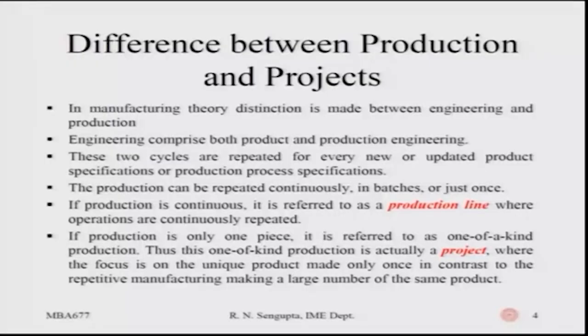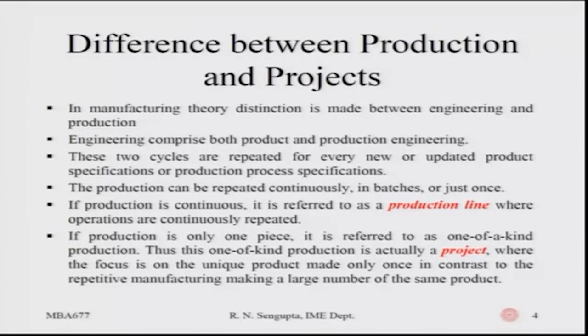Production can be repeated continuously, in batches, or done just once. The concept of 'once' — when you do a big project that will not be repeated again — is where we bring in the concept of project management. In production, if it is continuous it is referred to as a production line, and continuous repeated operations would not fall under project management. There is only one flow, on a standalone basis, done only once — hence the concept of project management comes into the picture.